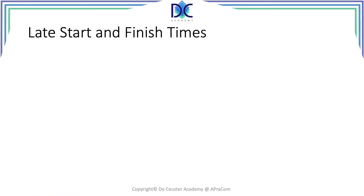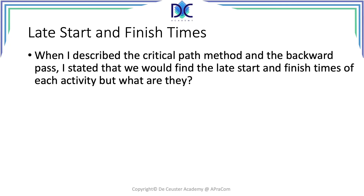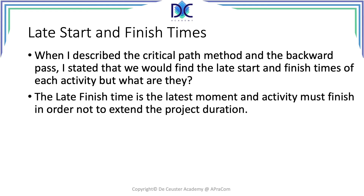Now let's have a look at the late start and finish times. In the critical path method we looked at the backward pass, and in the backward pass we find the late start and the late finish times of each activity. The late finish time is the latest moment an activity must finish in order not to extend the project duration. If an activity finishes later than the late finish time, it would have an immediate impact on the project duration, so the late finish is the latest time an activity can finish without changing the end time of the project.